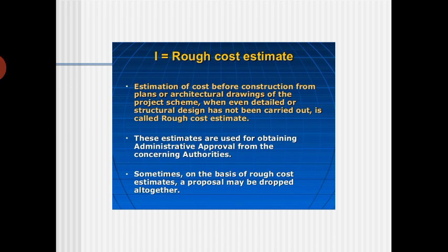So these estimates are used for obtaining the administrative approvals from the concerned authorities. Of course, sometimes on the basis of the rough cost estimates, a proposal may be dropped altogether. This is only for proposals.